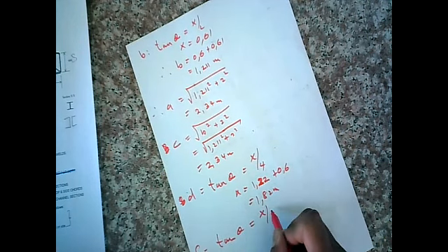All right, now let's break that down to make things easier. We know A is equal to 2.34, B is equal to 1.21, C is equal to 2.34 from there. D is equal to 2. Right, and if we tally all that up, you're going to be getting 16.44 at 8 kgs per meter, which is given. We get a total weight of 131.52 kgs.